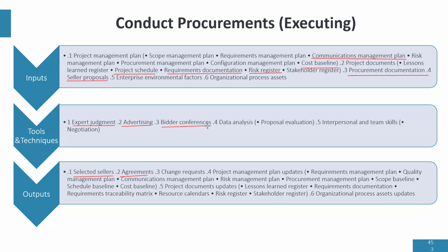Now, what's the disadvantage? Most of the time, when a company wants to get a vendor, they normally have private sessions with different companies and get their bids, right? But in a bidders conference, the vendors see themselves, and so they can gang up against the buyer and say, look, there's no need for us to compete.